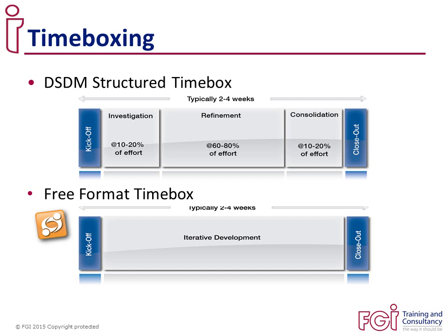The delivery in a DSDM project is achieved by segmenting the solution development into short sprints of work, known as time boxes. Typically 2 to 4 weeks in length, these time boxes are prioritised in much the same way as the features for the whole project. So if we have a delivery target of 12 weeks, we can accomplish this with 6 2-week time boxes, or 4 3-week time boxes, or even 3 4-week time boxes. It's entirely up to us at the time when we plan the project.